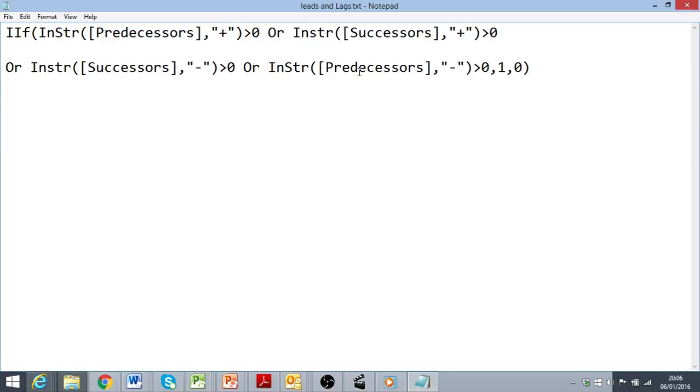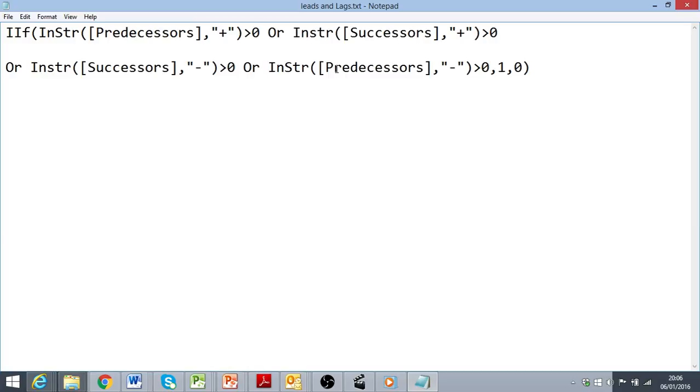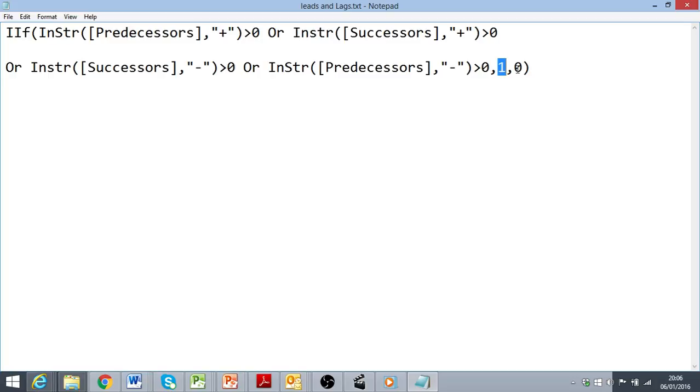All I'm doing then is to repeat this string function to look for a plus symbol in the successors field, a minus symbol in the successors field, and a minus symbol in the predecessors field. Now if any of those conditions are found to be true, in other words it does find the plus symbol or the minus symbol, it's going to return a value of 1. If it doesn't find those symbols in any of these fields, it's going to give me a value of 0.